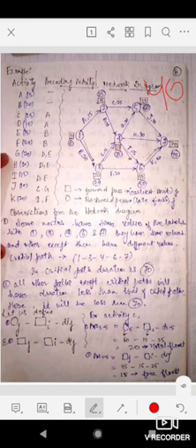So what is that? I will tell you now. In the forward pass, if at any node 2 or 3 activities are coming in, we will take the maximum time. See once again what is happening here.